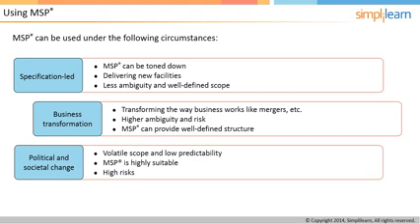Political and societal change programs focus on improvements in society. Because the scope is volatile, the predictability here is reduced as multiple external factors will be at play. For example, when we discuss the program for making a new city, it can have dependencies related to environment protection groups, government permissions, other stakeholders from whom land will be acquired, etc.